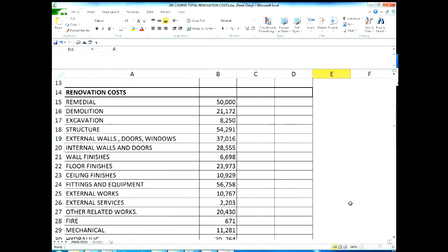So the 50,000 on the top, I have added in addition to the quantity surveyor's costings because there are areas of work in the existing house that aren't adequately covered. He would have included some roofing, some painting, some external work, but it wouldn't be sufficient to cover the house in its current condition because it's really in a poor state of repair.